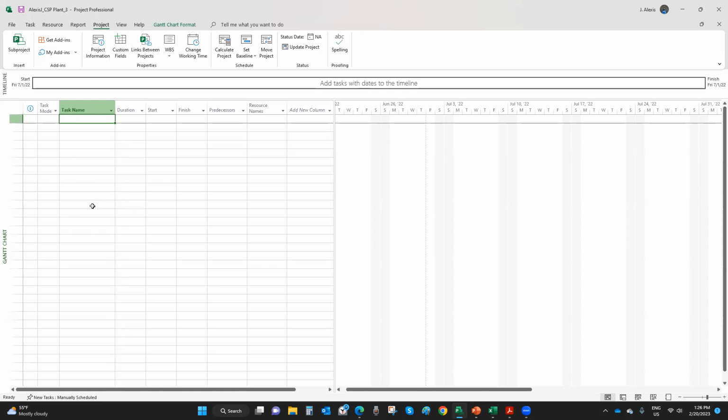When you work on a real-life project example, this project we're creating is a power plant project. A power plant project will follow what we call a predictive development approach. It's not going to be agile. It's not going to be adaptive. In a power plant project, you must be able to anticipate and plan as much as possible in advance. So in power plant development projects, people are not going to use agile. Not now, not in the next 100 years.